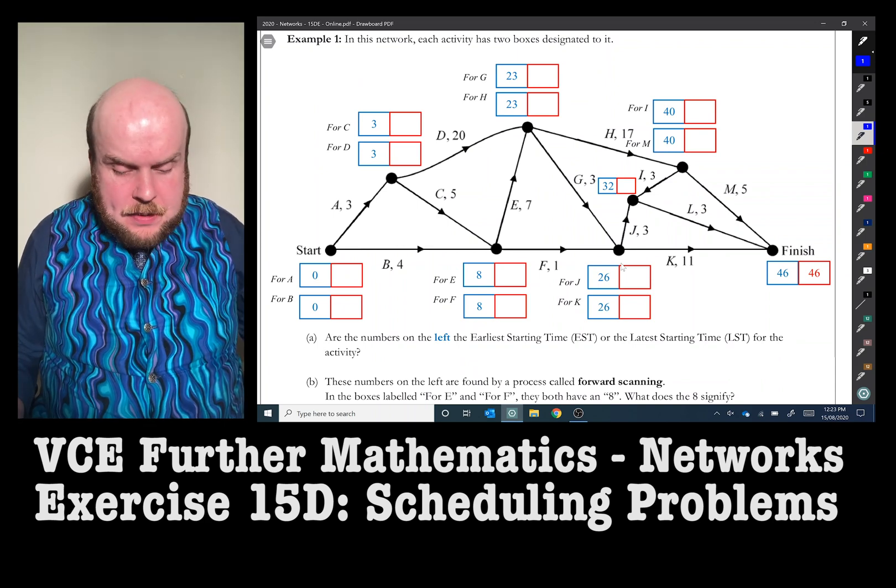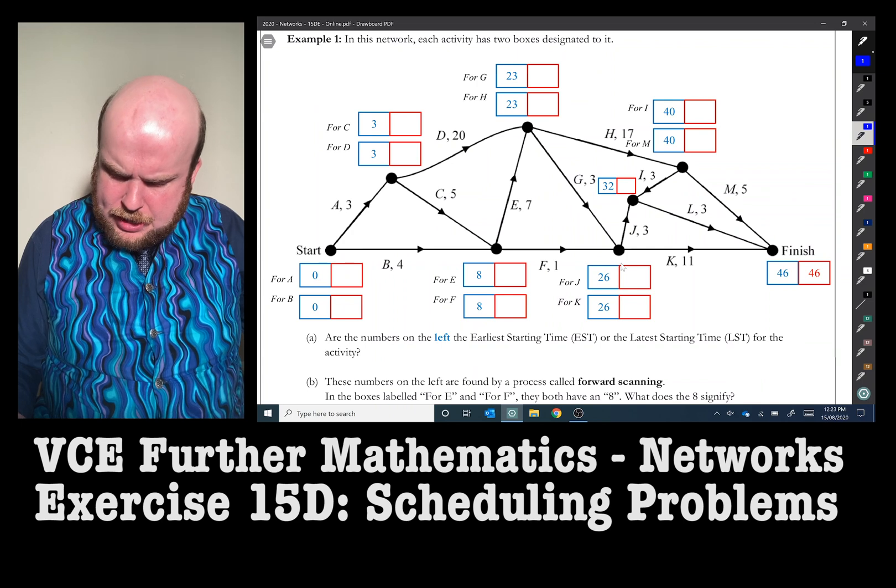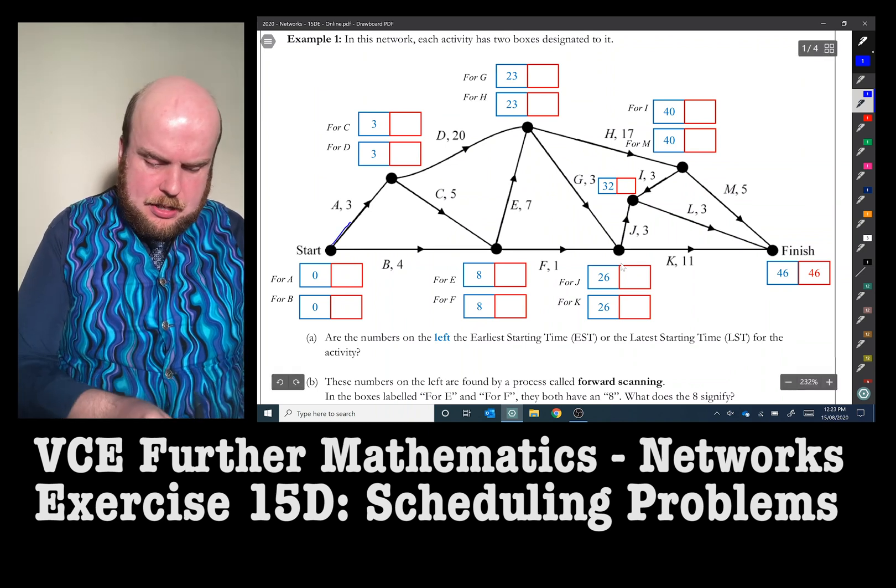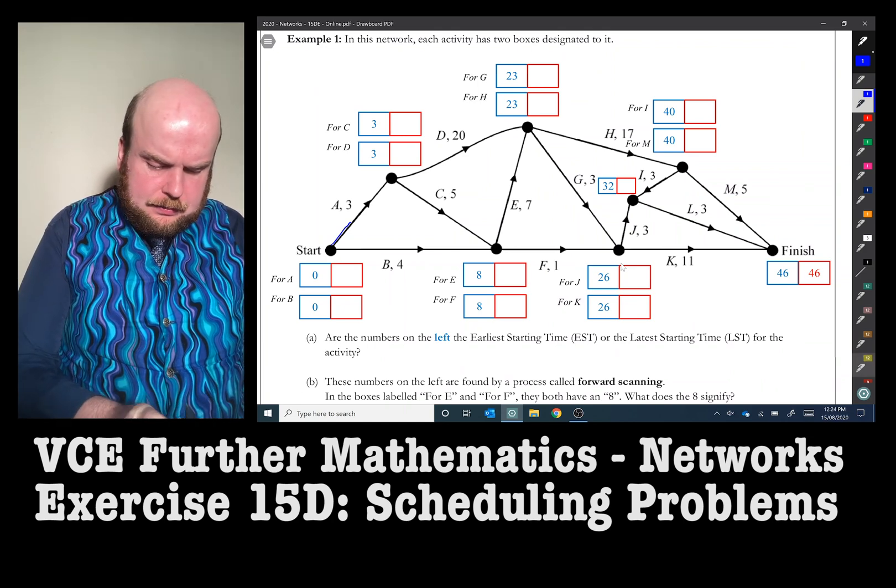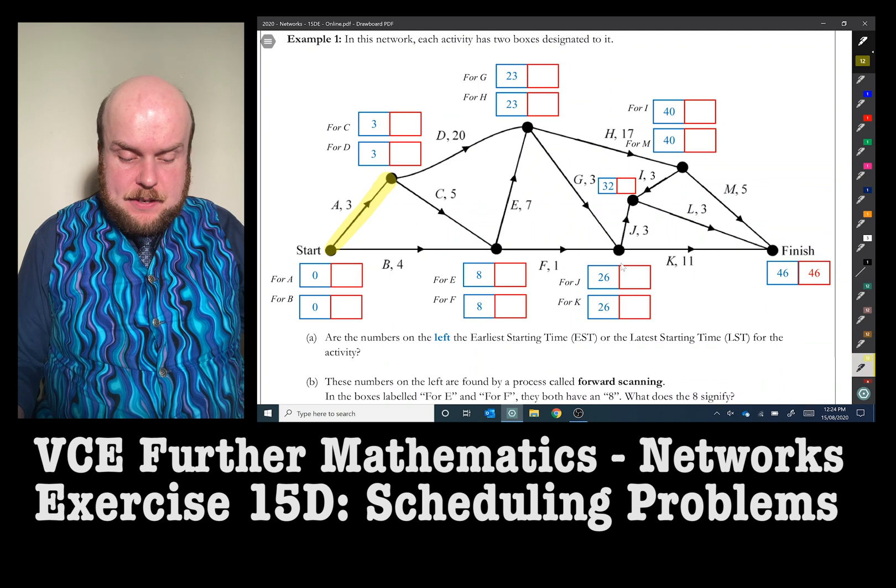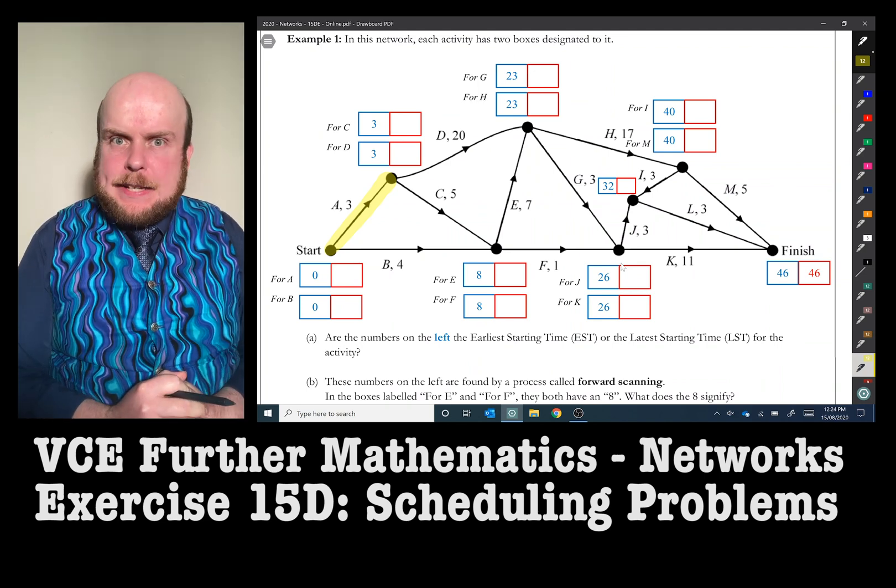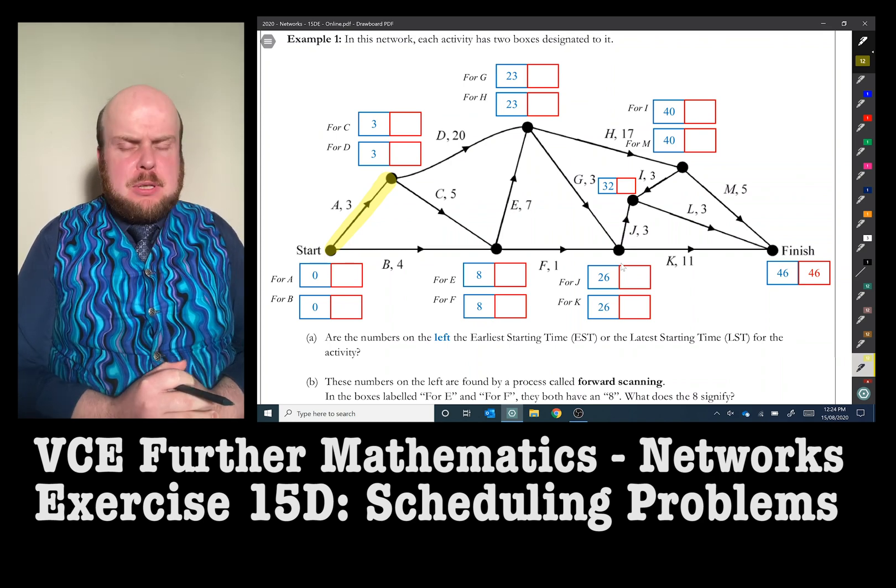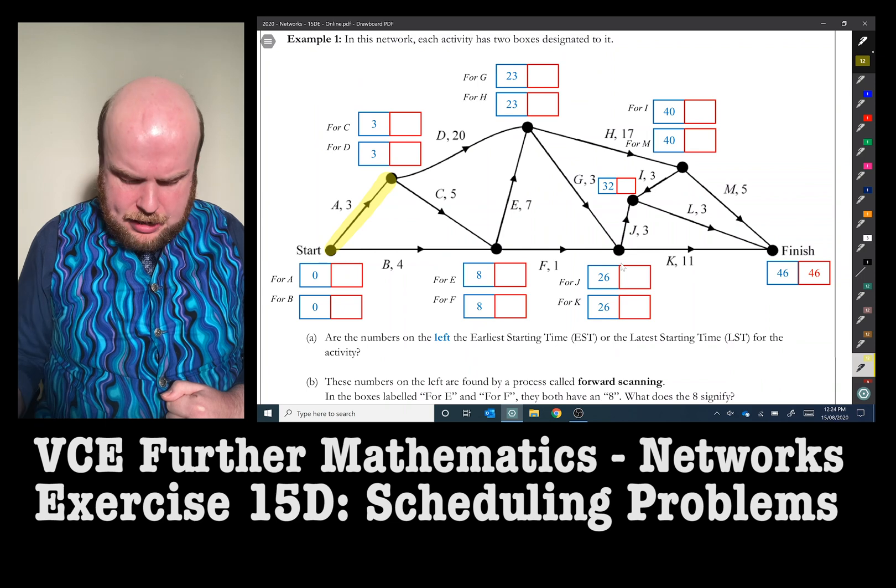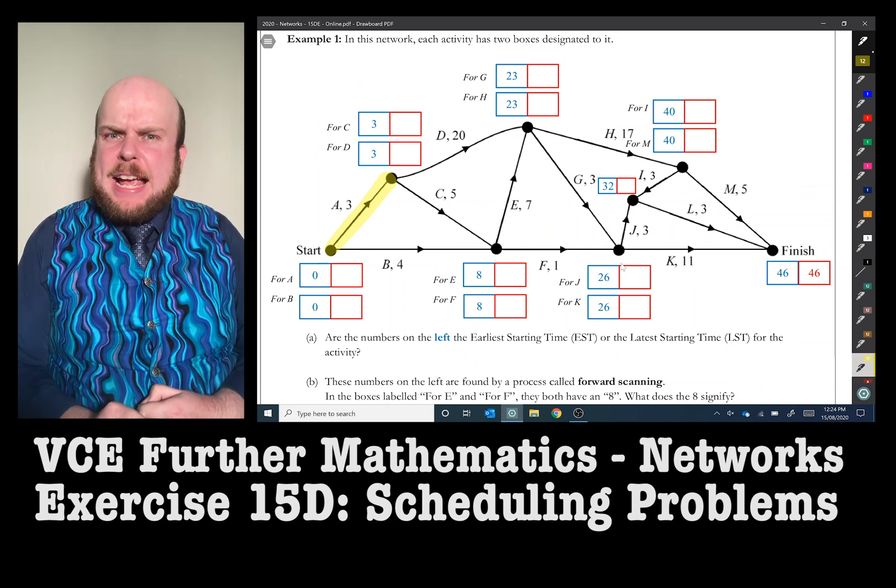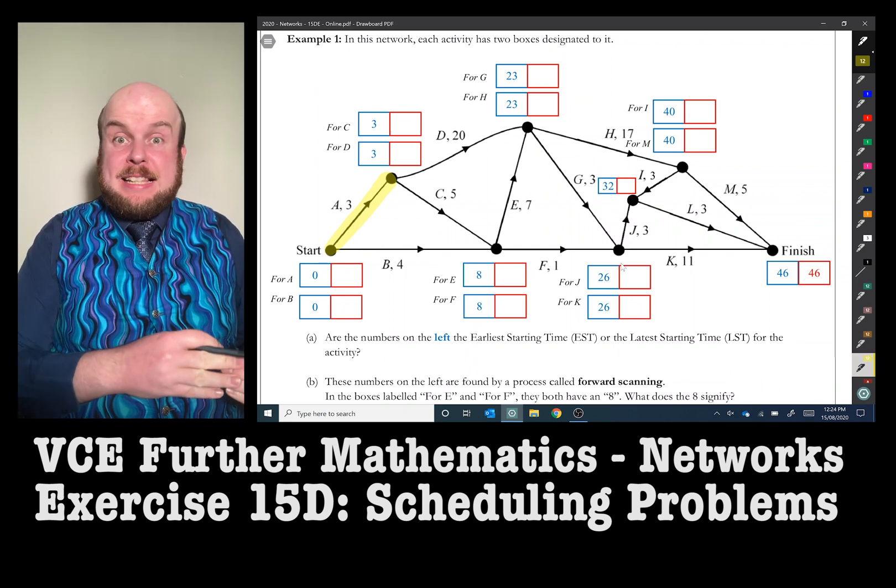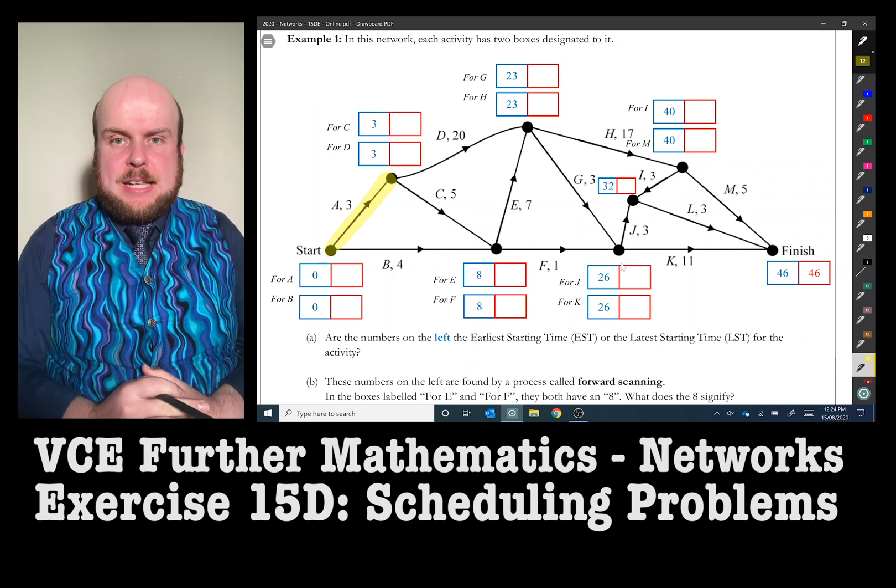So let's have a look at these numbers. Start with A and A has this peculiar set of boxes here. It says for A is zero, for B is zero. There's A up here. Let's get my little highlighter going, shall we? For A is zero, for B is zero, and then it ends to for C is three, for D is three. So what does that mean? Well, I would suggest that if that has a zero there, that would imply that this is the time that I would be starting the activity now, because it takes three hours to get activity A actually done. And so we can see for C and for D, if I want to start D, if I want to start C, I'd have to be at least, it has to take at least three hours for that activity A to be done.